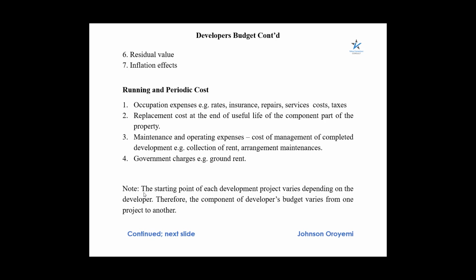Meanwhile, you can have another client that has not gotten anything, like land. In such a situation, you have to include the cost of land and associated costs in your developer's budget. So it is about understanding what goes into a developer's budget, and not just trying to cram, because like I said, the starting point of each development project varies from client to client, from developer to developer.